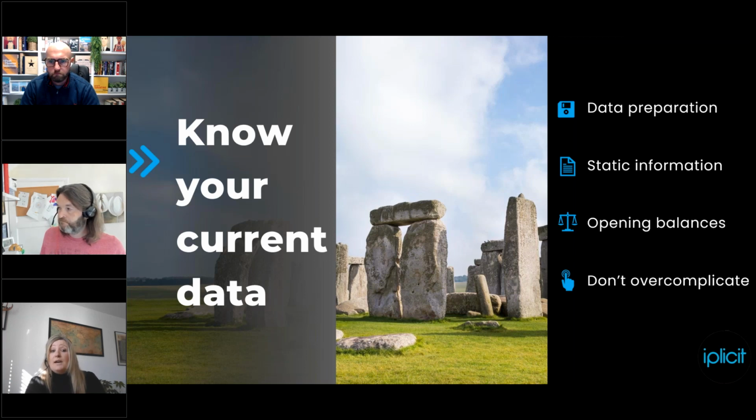So that's all in your live system, because clearly the time it takes to get the data out, I think 9 times out of 10 is underestimated. It will take you probably double that. But then the danger is that everyone just goes, oh, I haven't got time. I've got my day job. I've got this, I've got that. I'm just going to chuck it in. Again, that also doesn't help, because what you've done is you've replicated your legacy system with a brand new system, and you've just brought over some of the mess that you were hoping to avoid. So just with a planned, scheduled training, right timeline, you can achieve a nice, clean new system without it being too complicated.